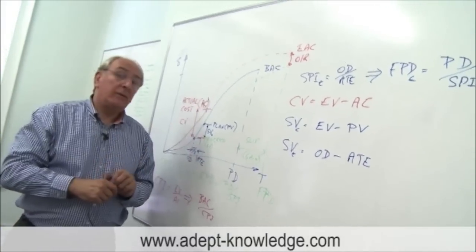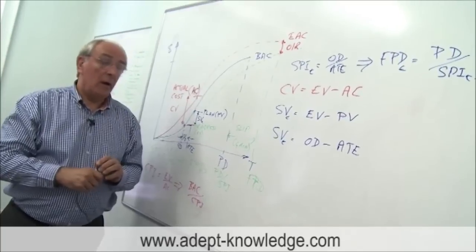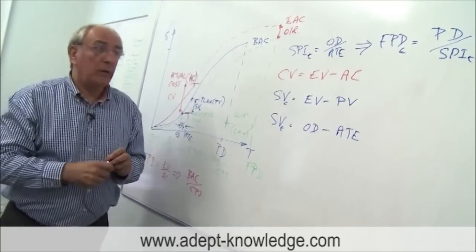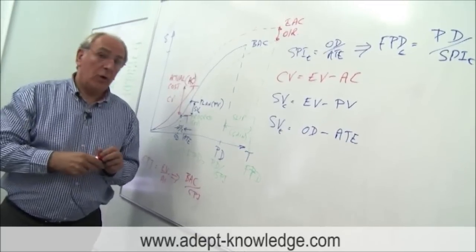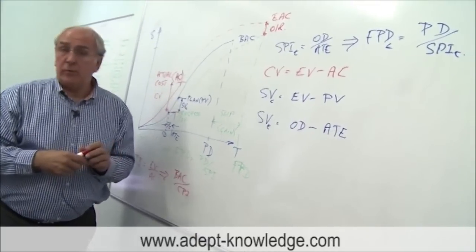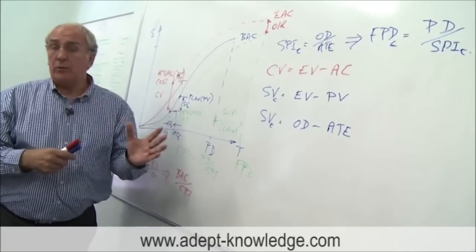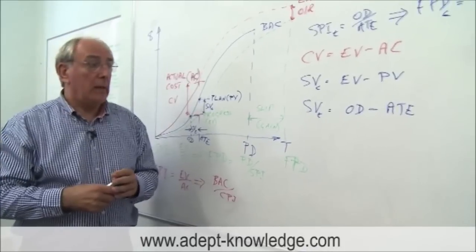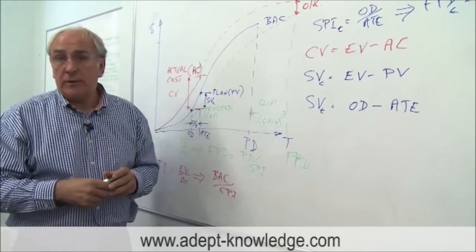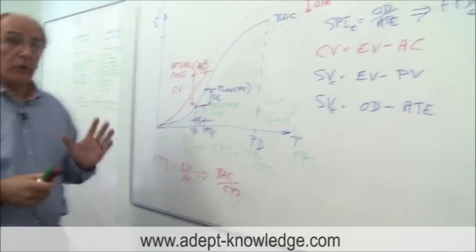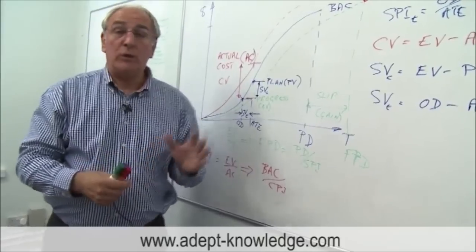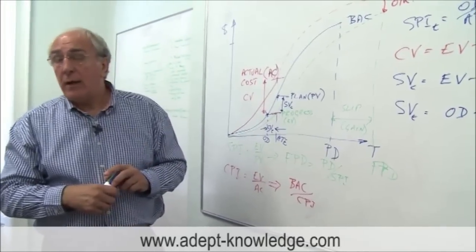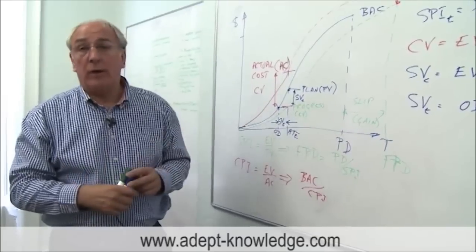And the third pieces of intelligence that come out of this are the variances. And if you recall, the cost variance was the difference between the earned value and the actual cost. The schedule variance was the difference between the progress that we made, the earned value and the planned value. That was the earned value minus the planned value. And our schedule variance on time was our original duration. You'll recall that that original duration was when we should have achieved this earned value and that's minus the actual time. And that's going to tell us how late we're running on this project.